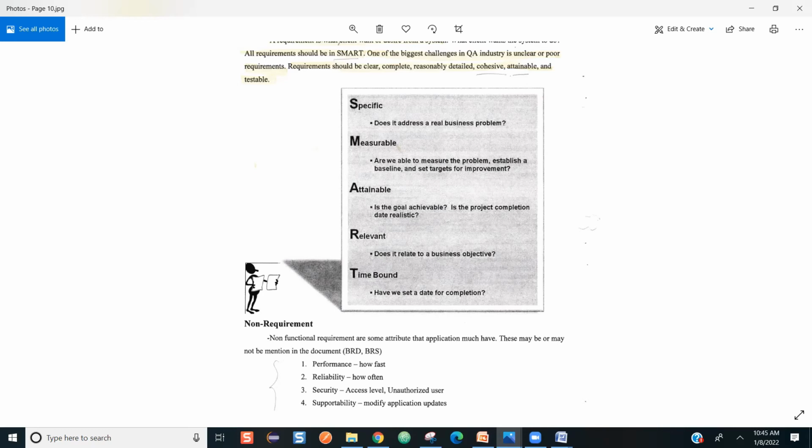as well as the agile model. In the agile model there is a term called sprint, which has a duration. Within that duration, once you have assigned all the work, you cannot change the requirement for development purposes, because that will hamper the timeline and you cannot deliver within the timeline you expect. For example,